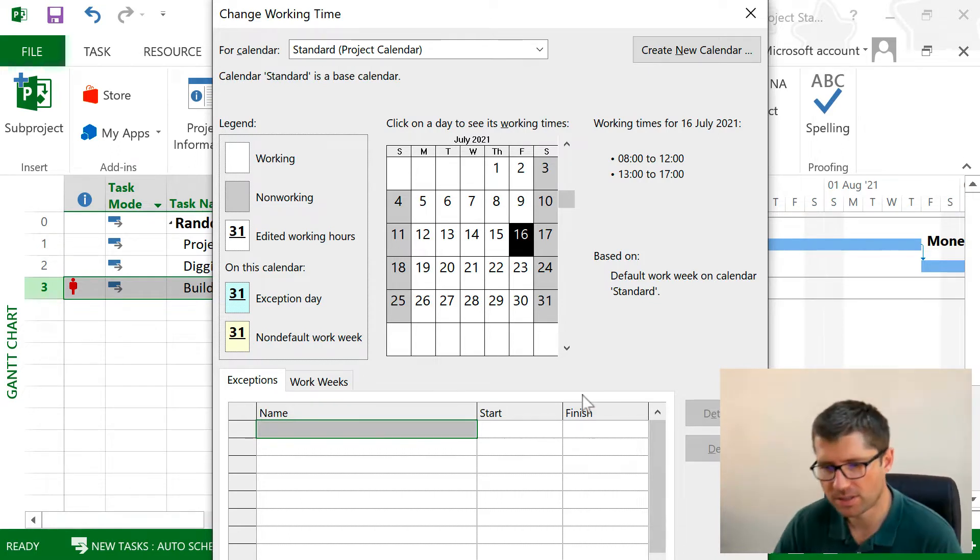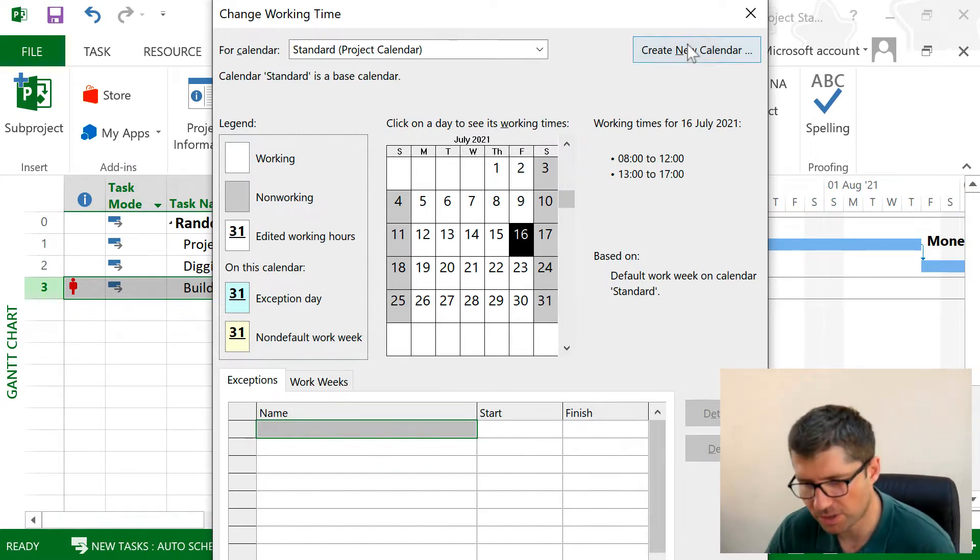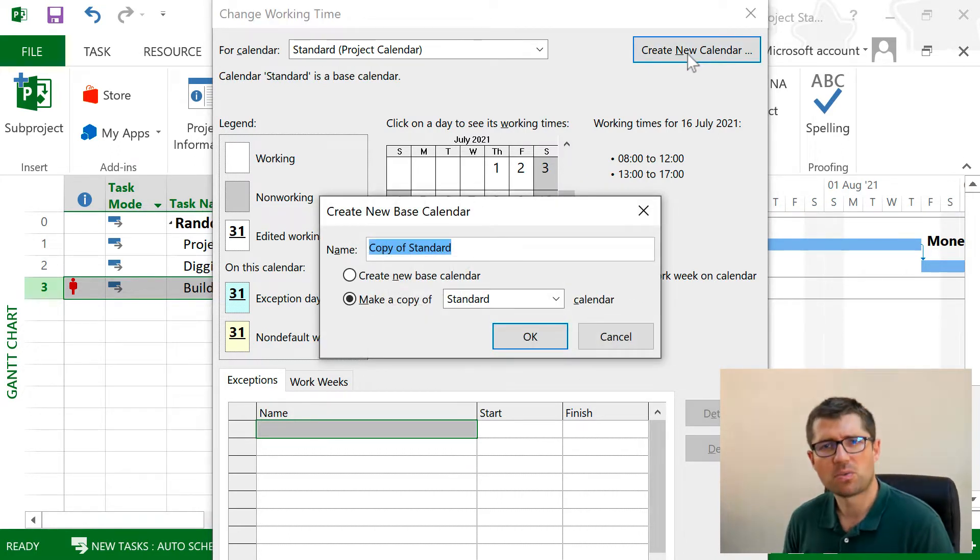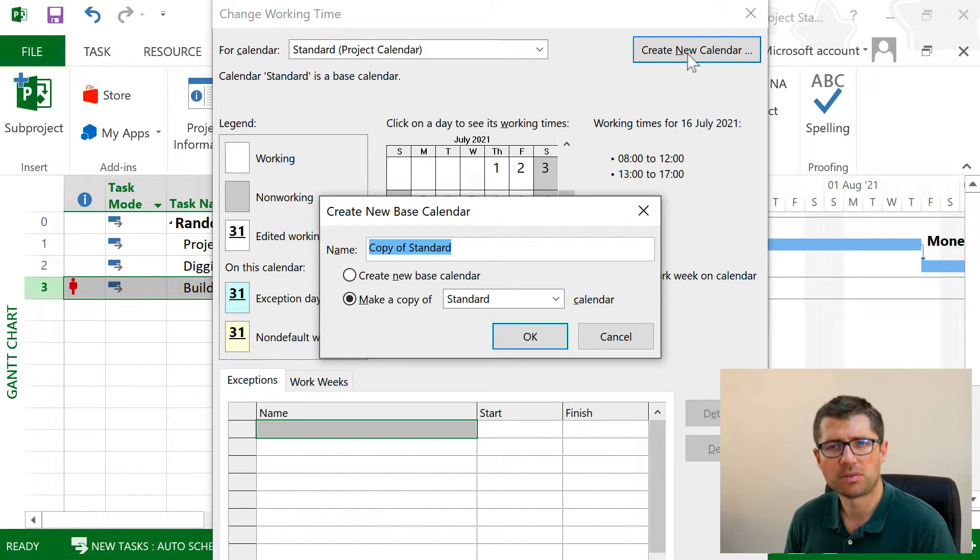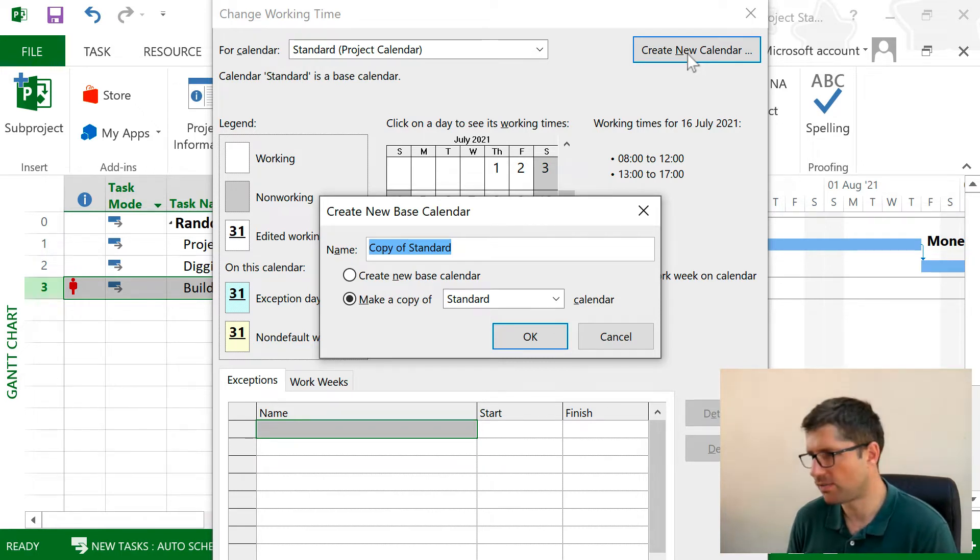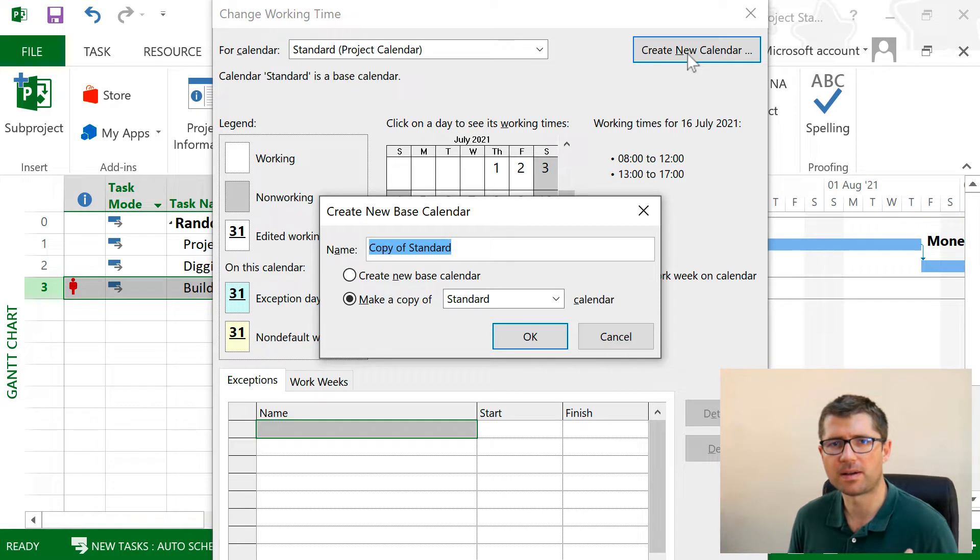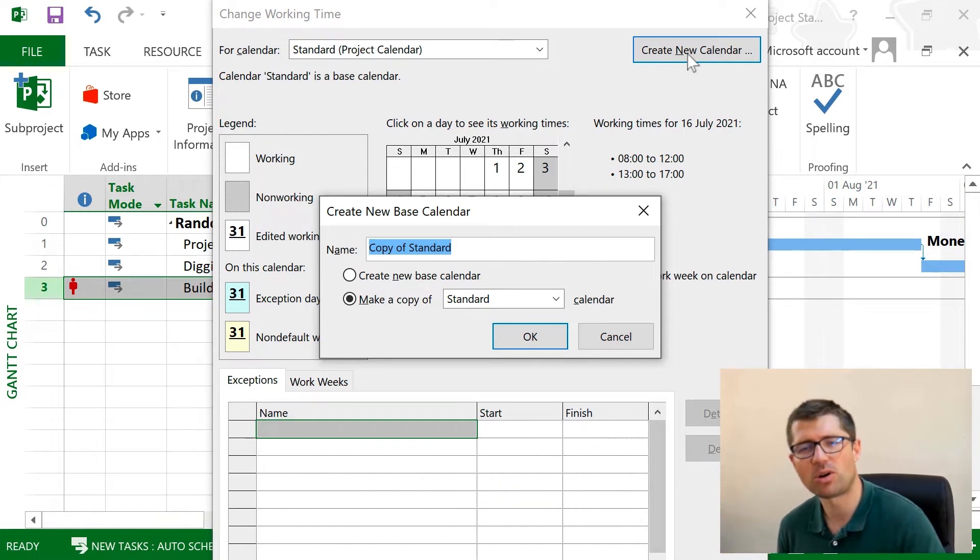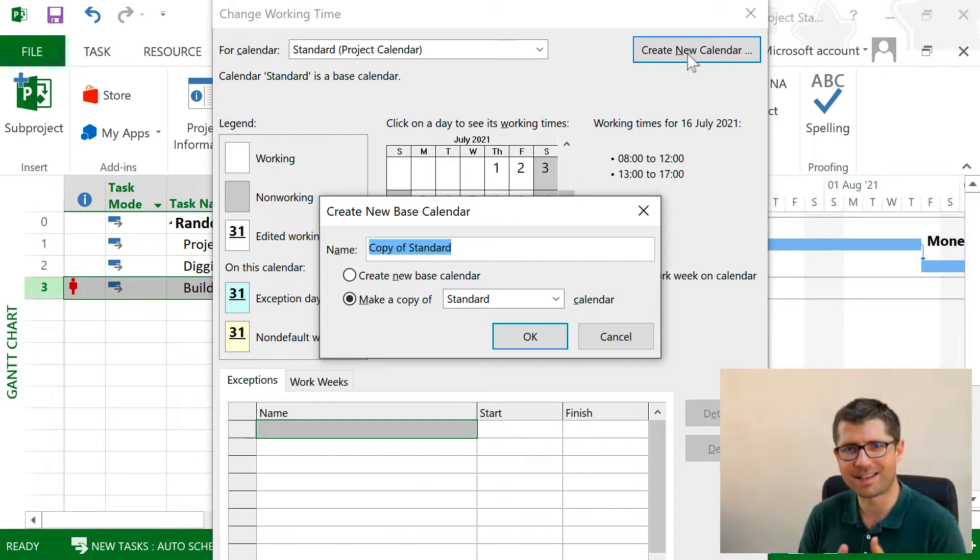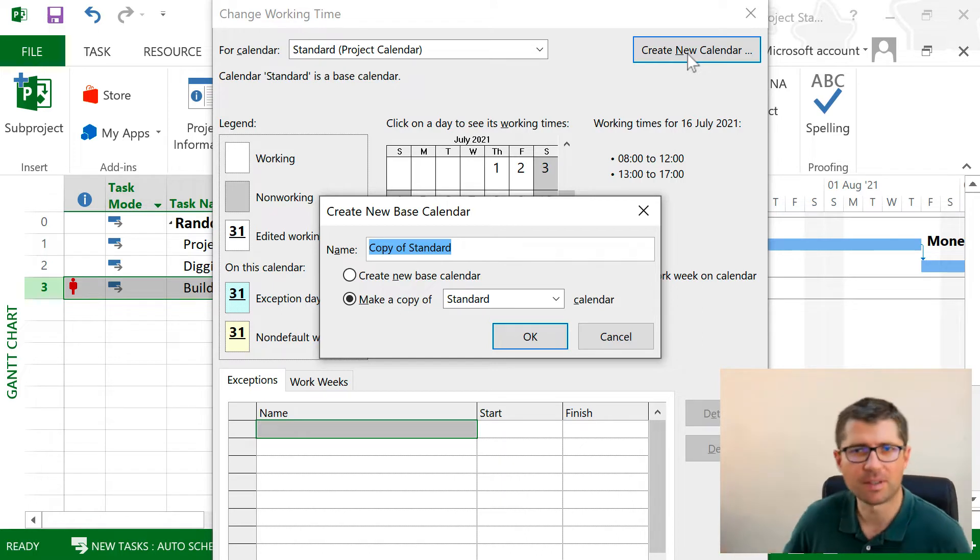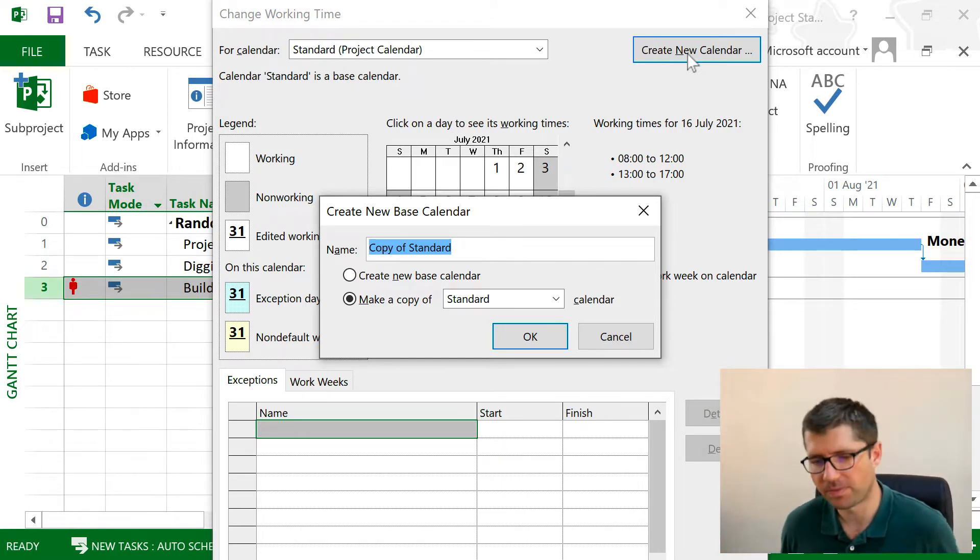But let's just create a new calendar. I want to work on Saturdays for eight hours a day, and I also want to have the bank holidays as days off, so I know I won't be planning something on a day off.